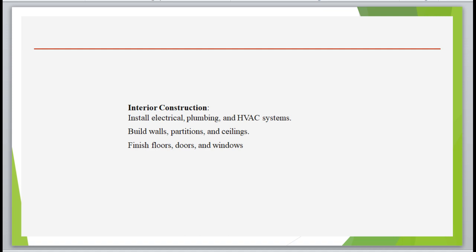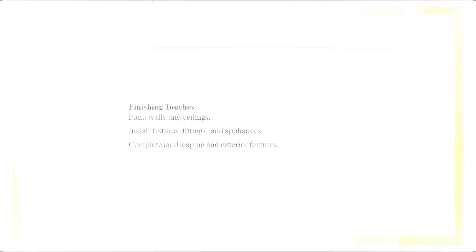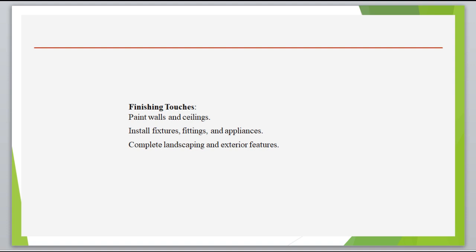So these can be built now since they are not load bearing. They can be established freely after having the load bearing walls built during the skeleton. Then you install the doors, windows, and the floor finishes. Then step 6 is finishing touches.